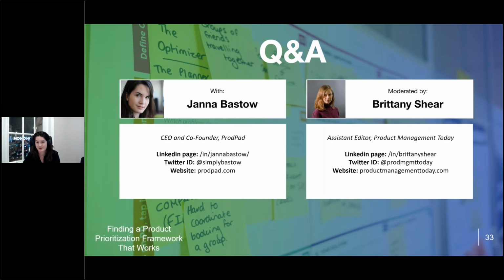I'm not sure I have an answer for you. I don't think any team has a strict answer to that one. But what you should be doing, when you are a product manager prioritizing for what needs to happen next, is prioritizing for the next 2 to 4 weeks' worth, the next 1 to 2 sprints ahead or so, at which point you should have pretty reasonable ideas of who's going to be working or not.